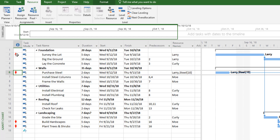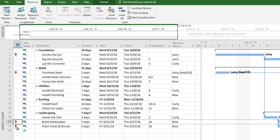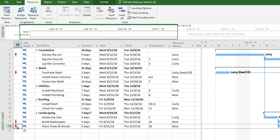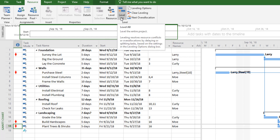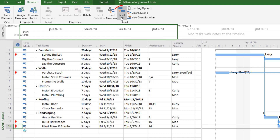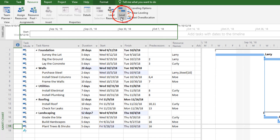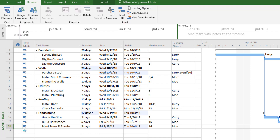There are little red men appearing in the first column — this tells me I have resources that are over-allocated, meaning they're assigned to work on multiple things at once. I need to fix that by leveling the resources. Going to the Resource tab and clicking Level All will adjust the scheduling of activities to account for those over-allocations, so that Moe, for example, is only assigned to one thing at a time and moves to the next after finishing.